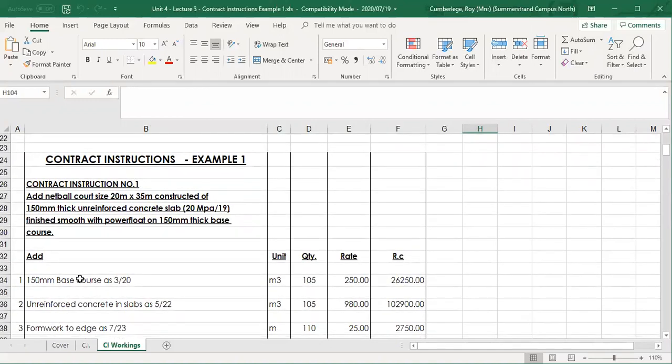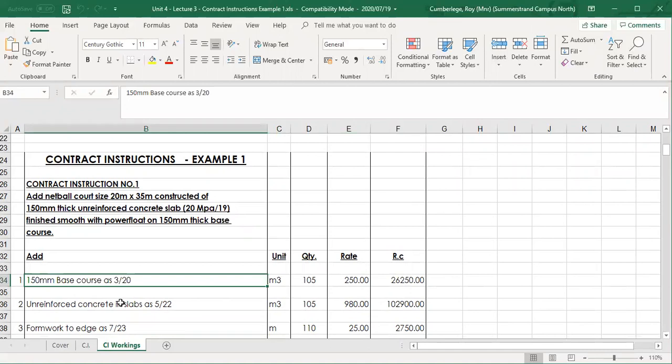So I'm not going to bug you with the actual quantities. I'm just going to highlight some principles. We've also learned, if you look at the very first description here, it's not a fully detailed description. The bill will have the full detailed description. We all know by now, we will refer to the bill, and in this case, we use the as item 3 on page 20. So it's just a very concise description. It is still in the order of the bill: the quantity, the unit rather, quantity, the rate, and then the amount.